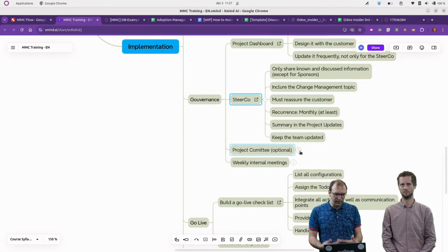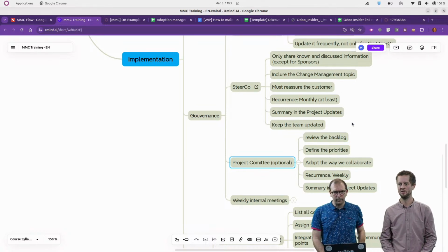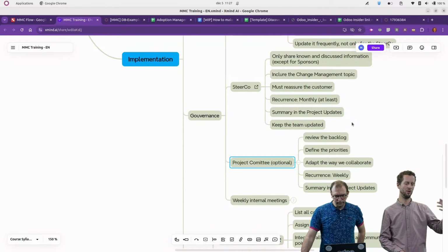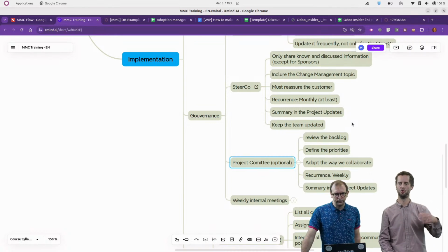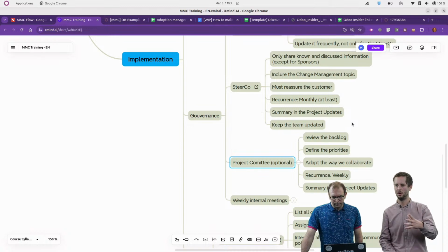And that's based on that information that we can explain to the customer and that we can defend, that we will base our estimates. Yeah, you're right, because in the past we tried to automate a lot of computation in different estimation, or the way we do the ROI analysis, and we tried to remove that, to simplify that, and to push people to think, is this number really valid? Why did I put this amount of days?